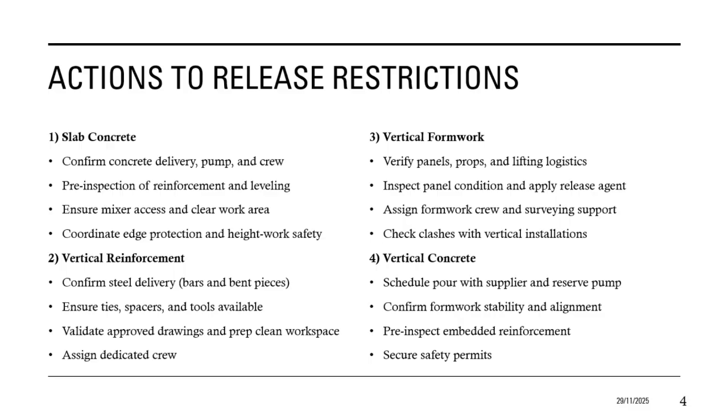Inspection-based restrictions include many structural tasks that depend on timely review by supervisors or external inspectors. These are managed by pre-scheduling inspections, streamlining approval routes, and preparing documentation in advance to avoid last-minute observations.